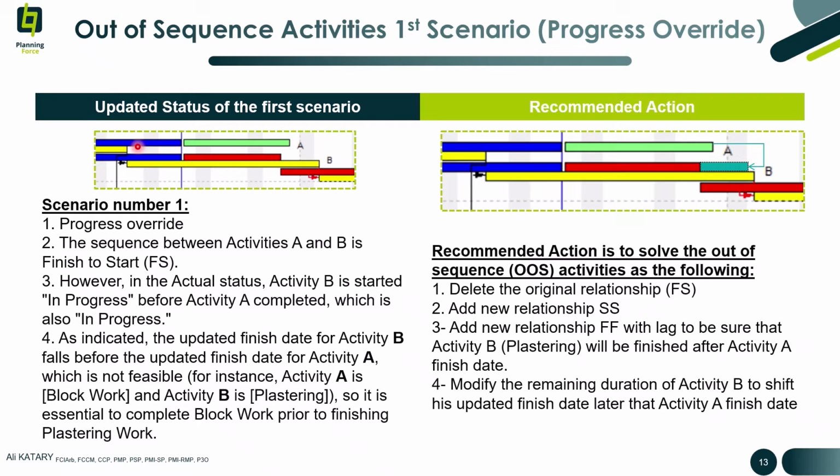Let's consider activity A is block work and activity B is plastering. So it is not logical that activity B finishes before activity A. It is essential to complete block work prior to finishing plastering work.